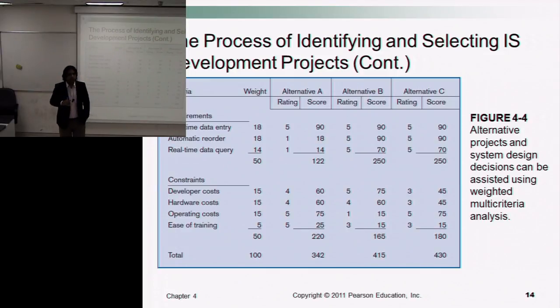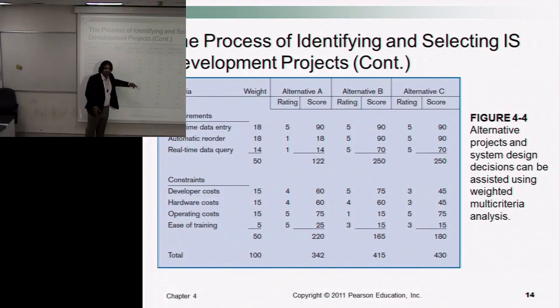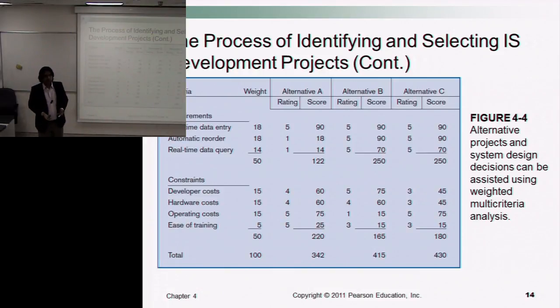So the decision, again, you should understand, is not that clear. It is not only based on the score we are calculating. Whatever is apparently visible may or may not be in the final selection. In cost ratio, B and C are the best. Yes, but I can say that since I have a very limited budget, I cannot go for solutions B and C, maybe not only because of the cost but also because of the time. That may take longer to complete. I can say I need the solution earlier, so no worries. Even if it has a lower score, I can go for it because I need the system in hand early.